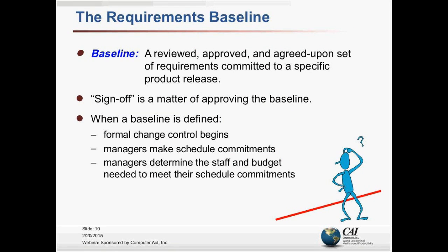The term baseline is a configuration management term. A baseline represents a snapshot in time — a work product or set of work products that can serve as a starting point for changes and as a foundation for subsequent activities performed on the project. We can define this baseline as a reviewed, approved, and agreed-upon set of requirements that are committed to a specific product release or iteration.